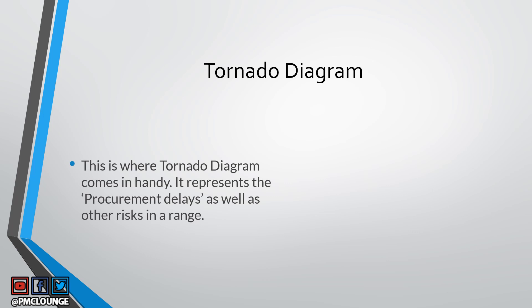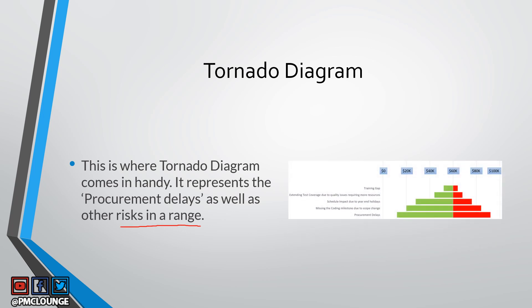The tornado diagram represents the risk of procurement delays not as an absolute value but as a range. Here is how a tornado diagram looks — you can see procurement delays represented with a range, rather than a single fixed value.